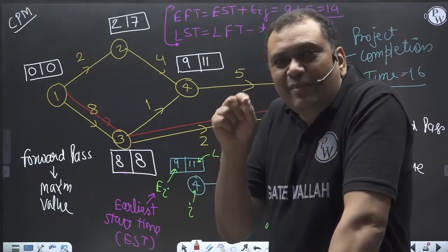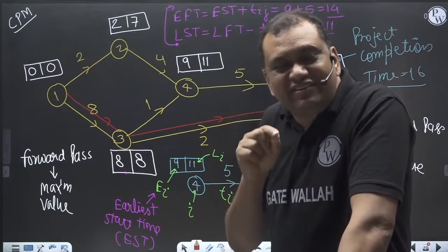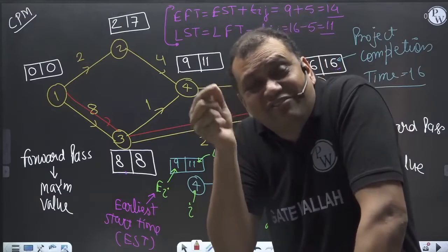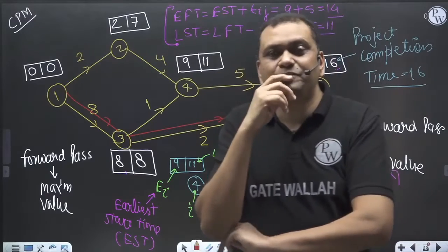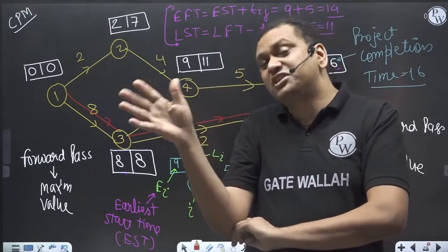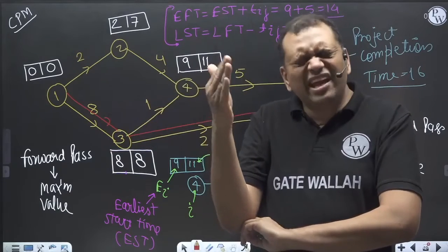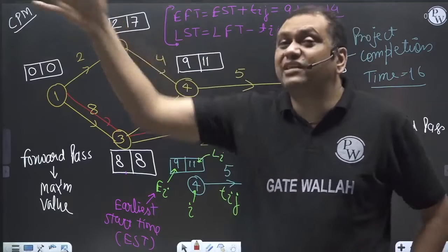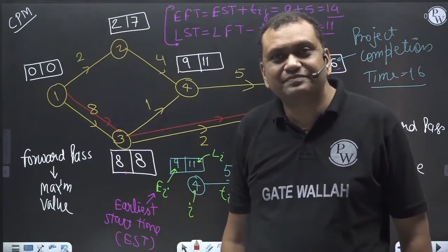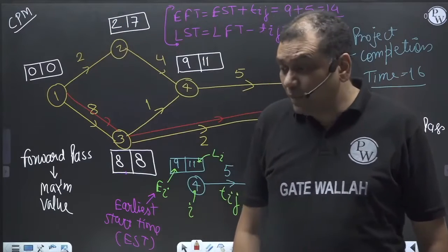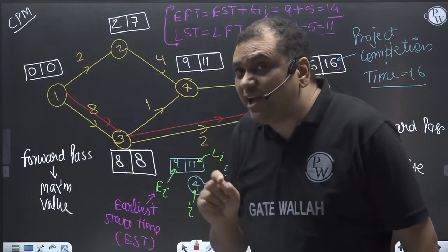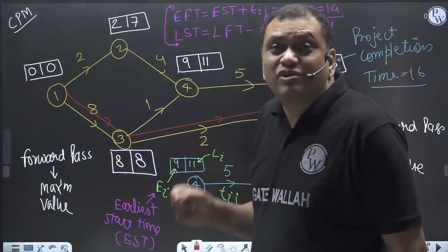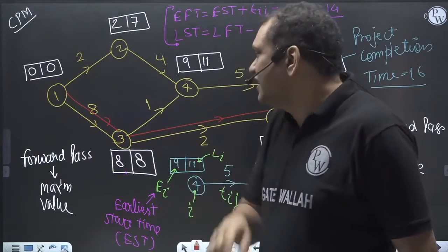Any amount of delay of that activity will affect the project completion time. So on the critical activity, we have to have a very close supervision. We cannot afford to have any delay on those critical activities.